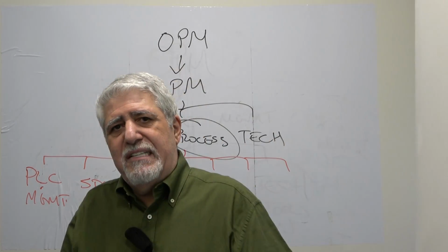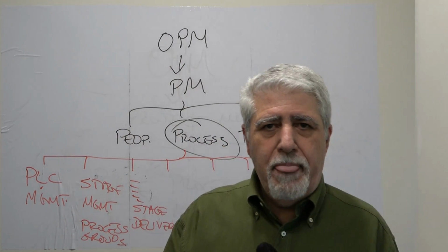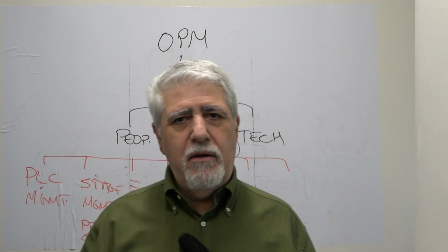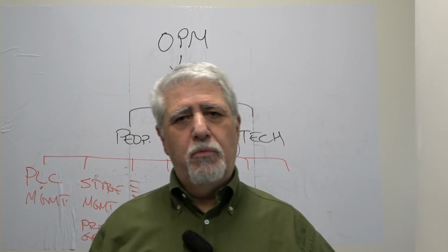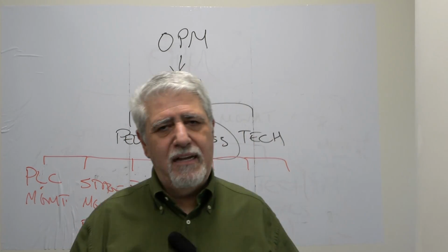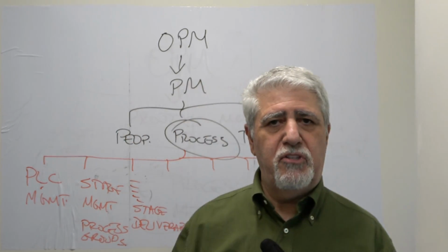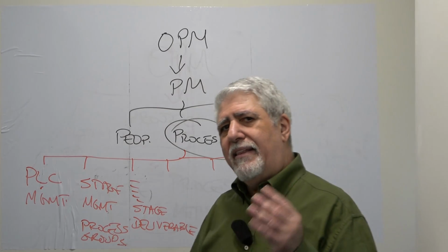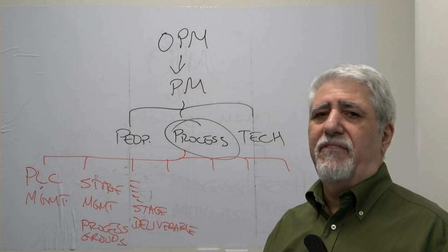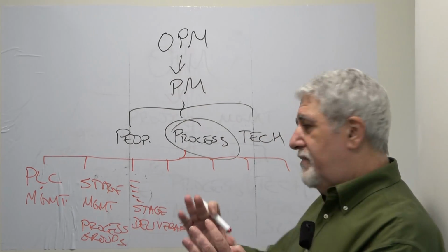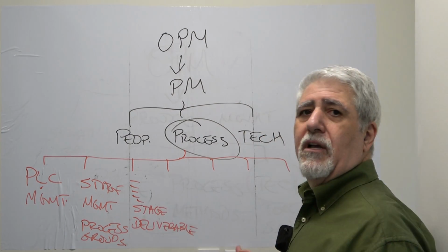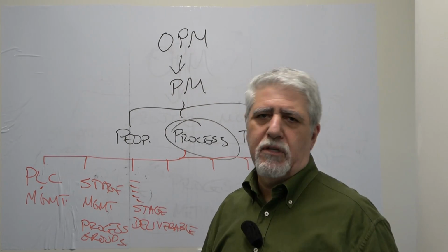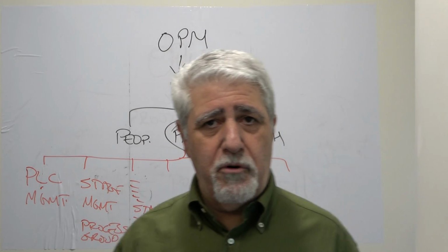So for example, if the stage is a feasibility study stage, during the stage we would work on developing and conducting the feasibility study, market research, financial analysis, financial modeling, cost estimating, scheduling, whatever needs to be done during that feasibility study. But at the end of the day, when we finish that stage, we have to produce a report. Typically, we call it the feasibility study report.